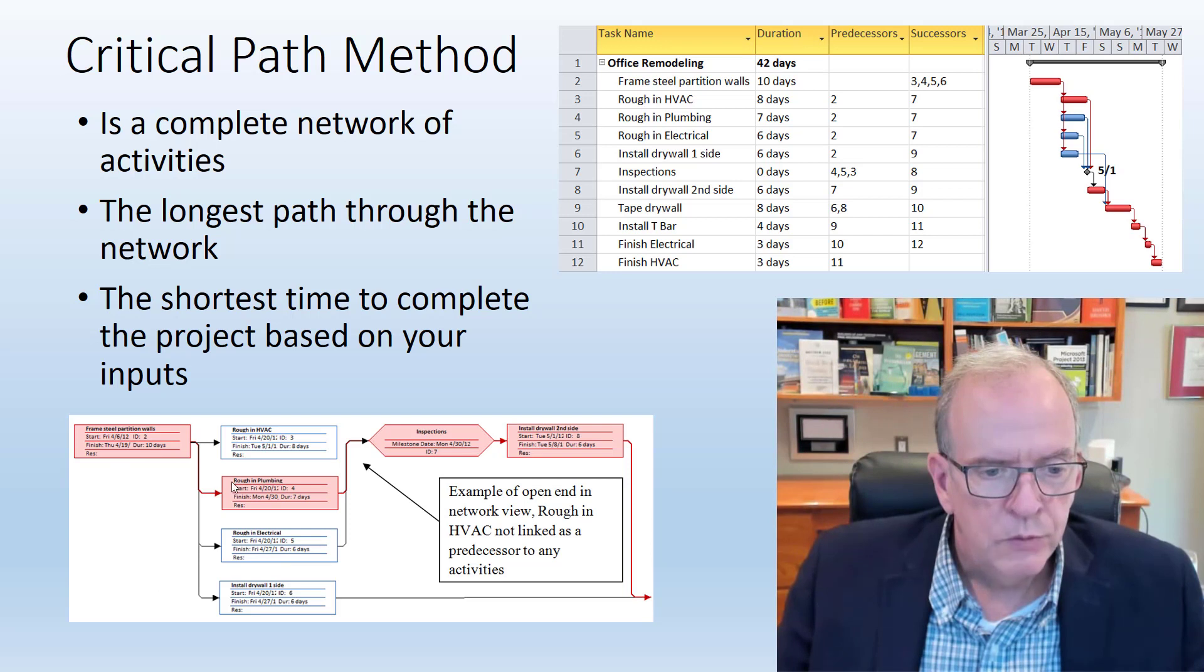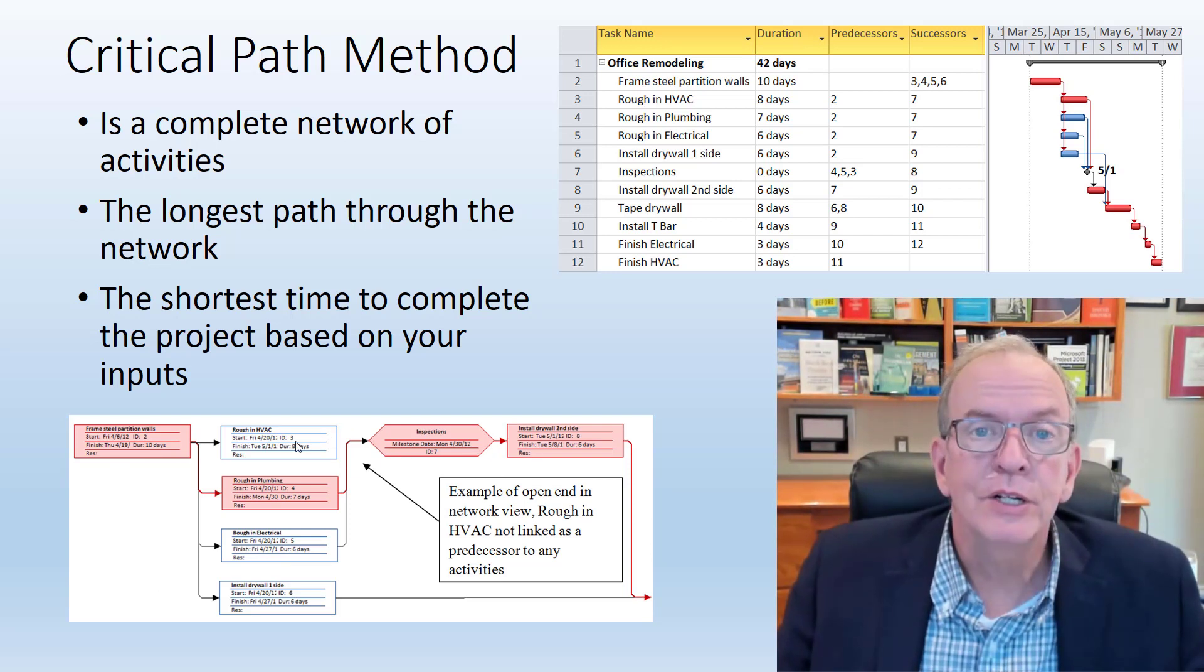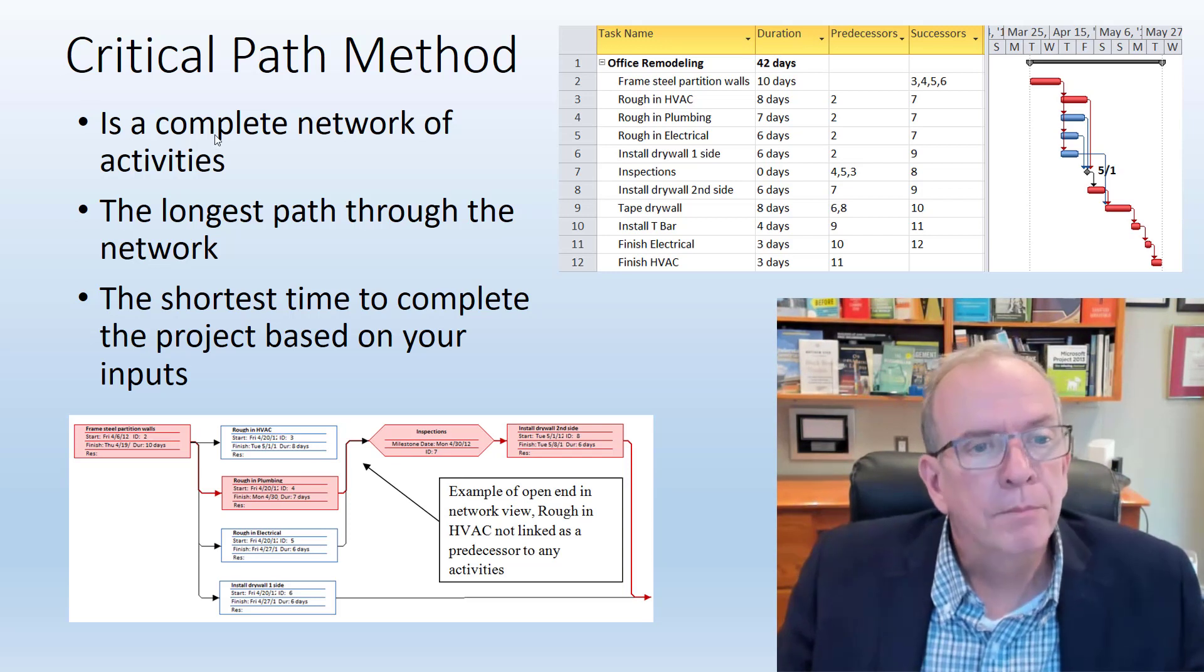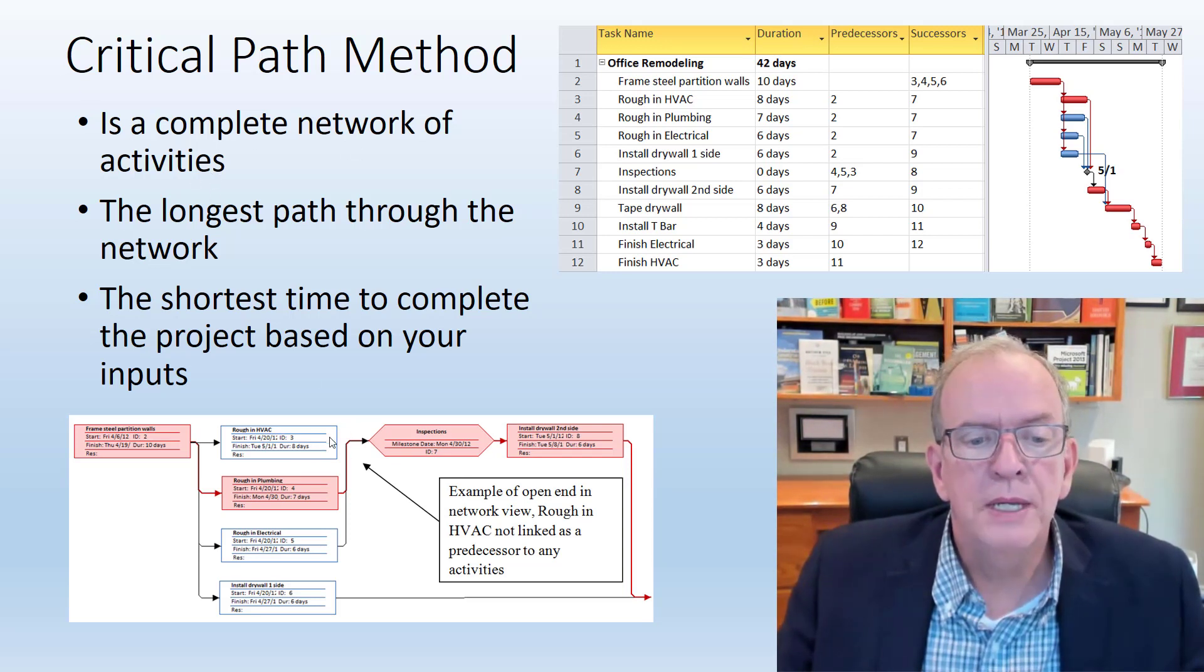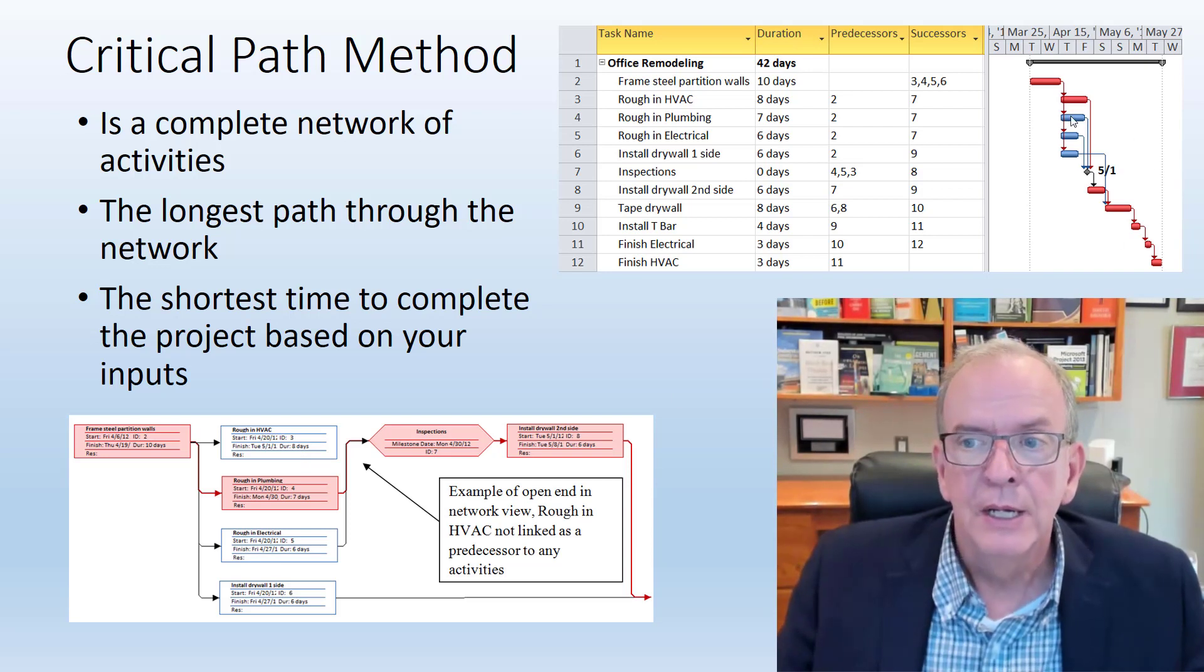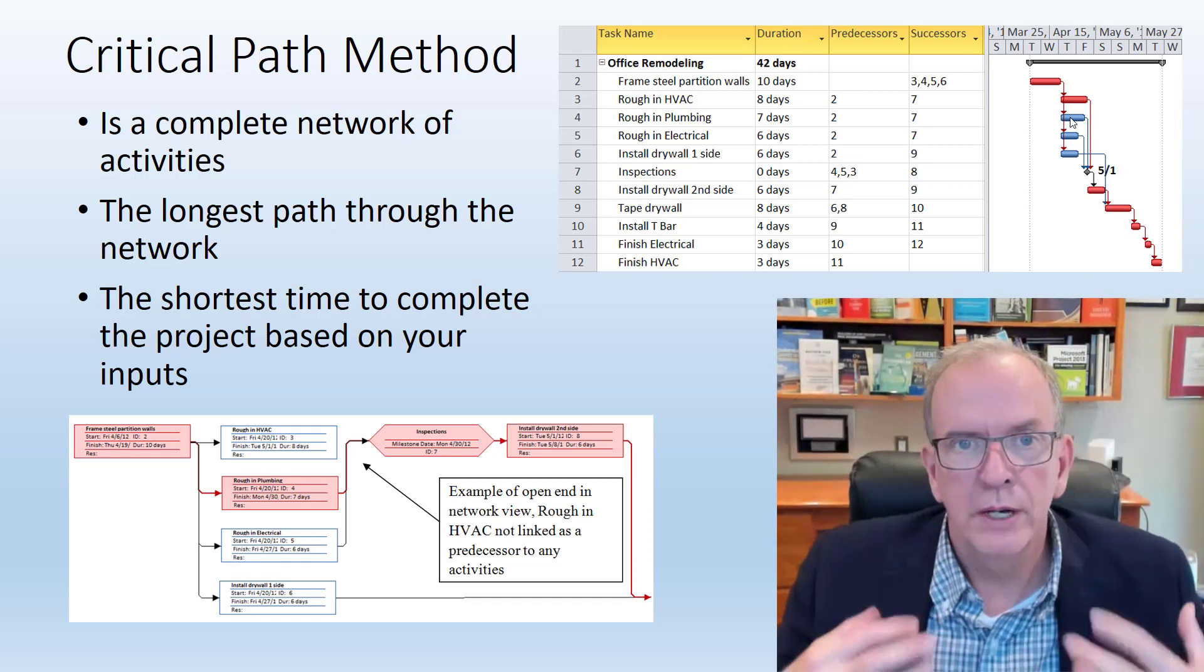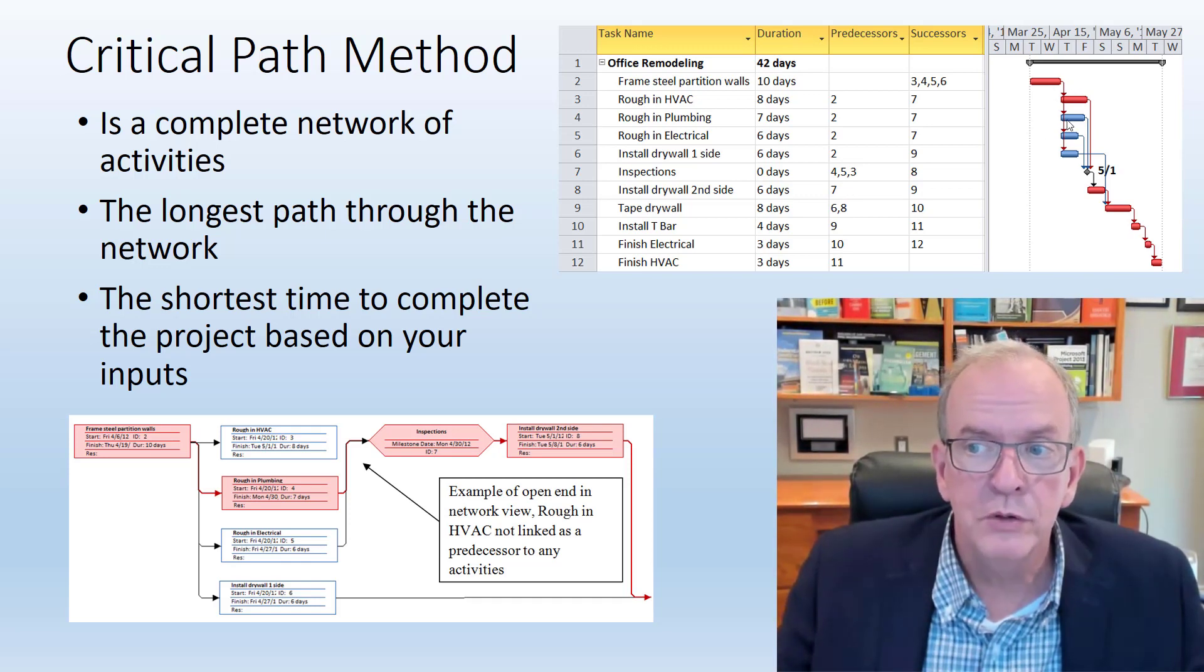You can see in red here, that is the critical path. You see this one, it's not connected. That's not good. It needs to be a complete network of activities. This should be connected to what makes sense. In this case, it makes sense to connect it to inspections like I have it up here. So that's an important element when you develop the critical path.